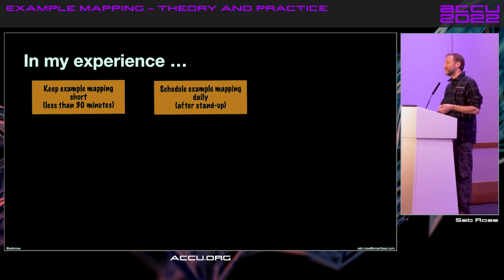In the unlikely situation that you have already gotten through enough stories and you've got nothing left, that your backlog has got enough on it for the next 6 weeks or whatever, or however long it is, then cancel the 30-minute meeting after the stand-up. Nobody I've ever met has ever complained of a meeting being cancelled and being allowed to go and do something else that they want to do.